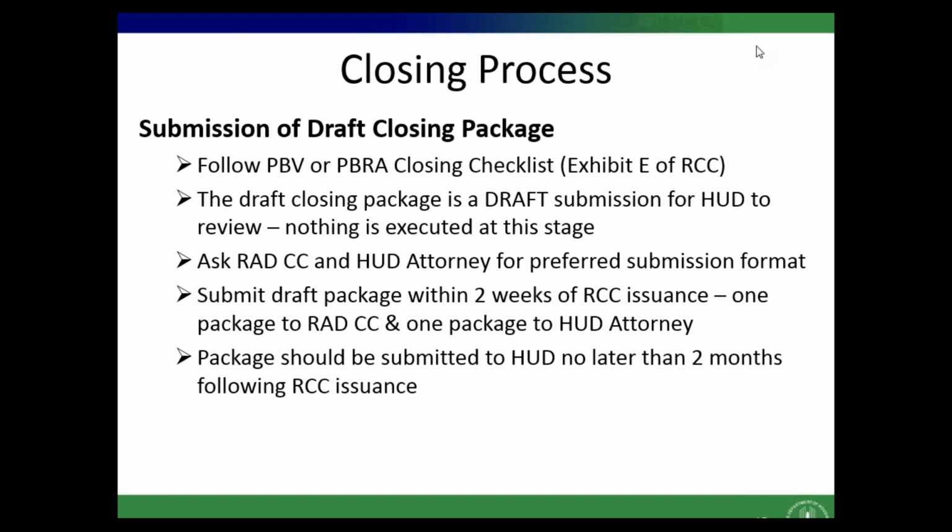We're saying you have to provide us with these documents and we will review them and make comments about them. And then when we're all cleared on the comments, we'll be able to get to executable versions. Our ideal is that you would submit documents within 2 weeks of getting the RCC. There would be maybe 2 weeks of review by HUD parties, maybe 2 weeks of responding to that review and an iterative process to get to the final closing documents that are acceptable to all parties, and then 2 weeks